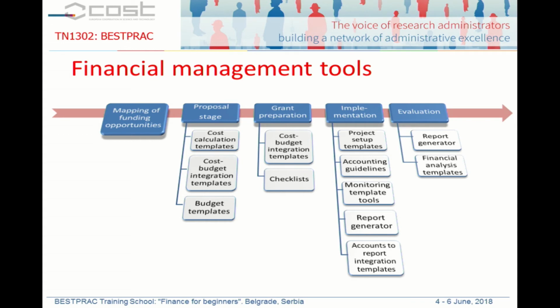But whatever system you have, have a template for setting up the internal project structure in your system. And make sure that you have the necessary tags or identifiers for your structure, so that all the costs can be charged to the right project.